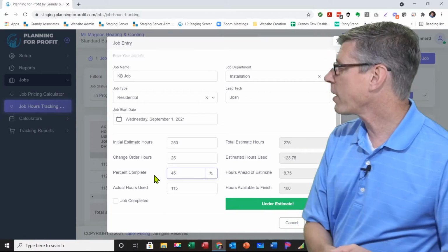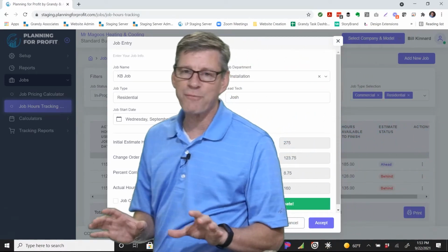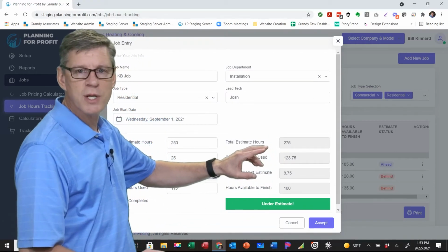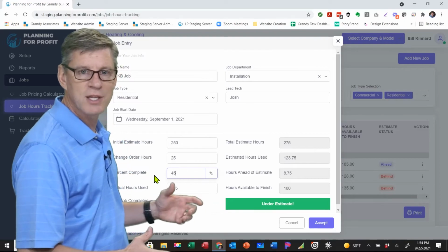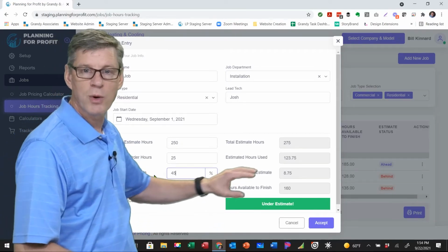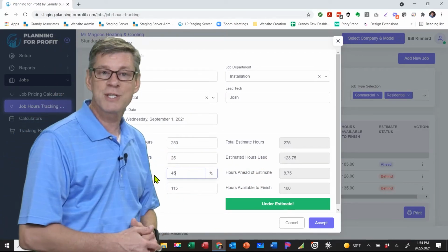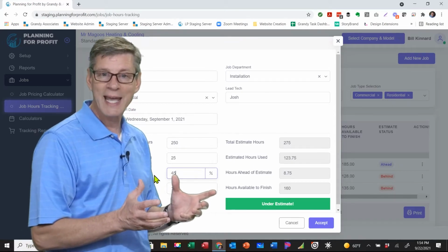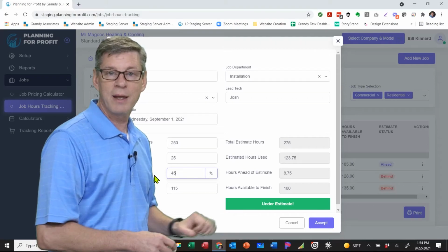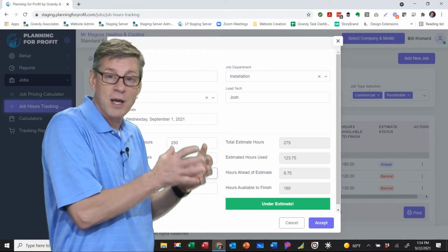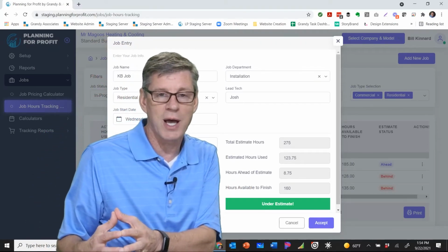Okay? Well, if we're 45% done, now at 45%, we would have used 123.75 hours. We've only used, at this point, 115, we're actually 8.75 hours ahead. And we still have 100 hours left to finish this particular job. And again, we're now under estimate. We're on target to come in ahead of schedule on this job.